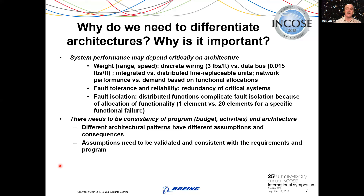Highly integrated architectures may be less amenable to effective fault isolation. Where we have a more classical architecture with a function assigned to a single element versus a function taking more than 20 elements to effect, that can make functional failure difficult to isolate among the possible 20 elements. A second aspect is that there needs to be consistency of the program in terms of budget, activities, and the architecture selected. More highly integrated architectures can be more difficult to integrate at different levels, and some things have to wait for final assembly before capabilities can be fully verified. If these are not properly planned, budgeted, and scheduled, we may run into program problems.